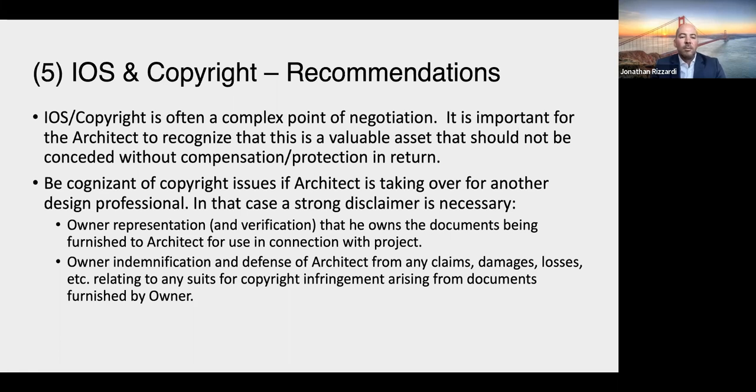You need a strong disclaimer. The elements essentially are: the owner has to represent that he owns the documents. He has to be able to verify that to you. And he's got to be willing to indemnify you, to step inside your shoes if there is a claim from a third party or the prior architect.